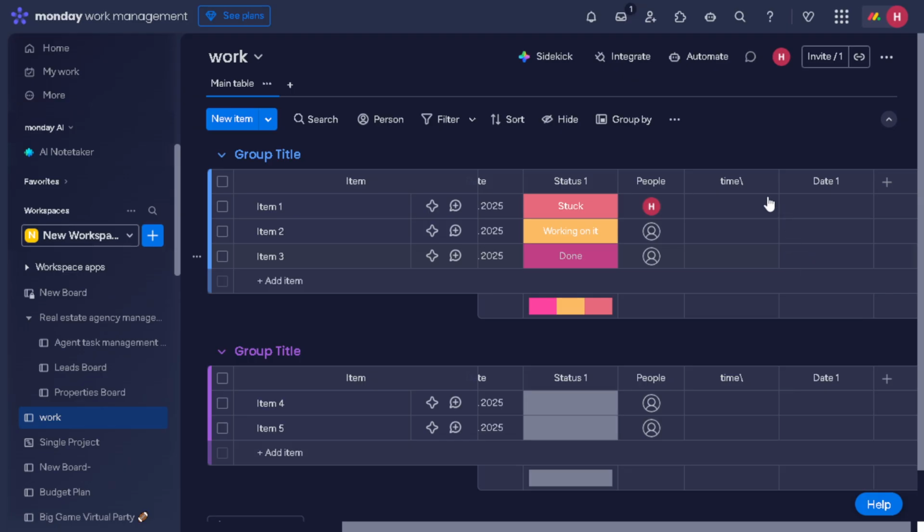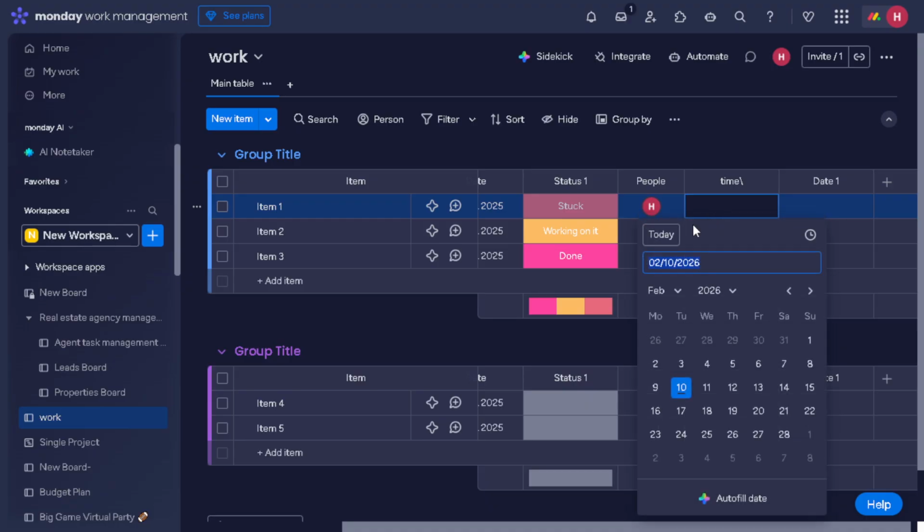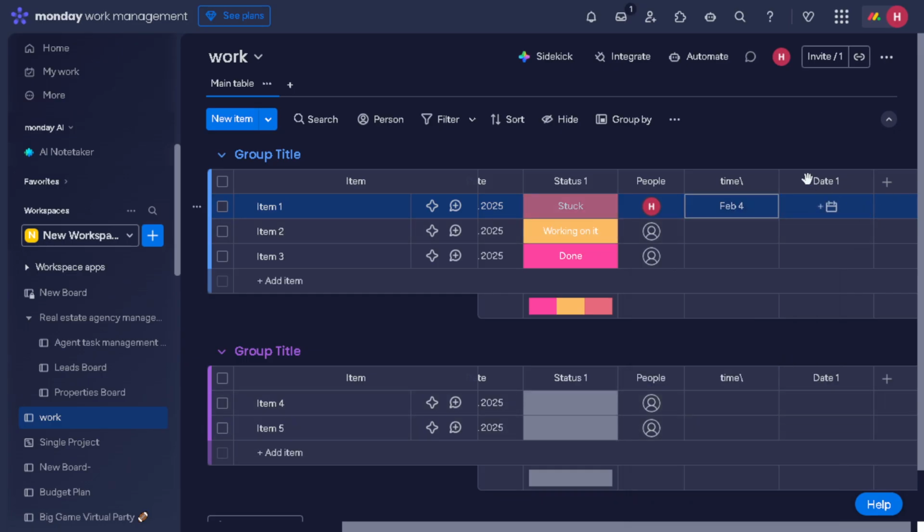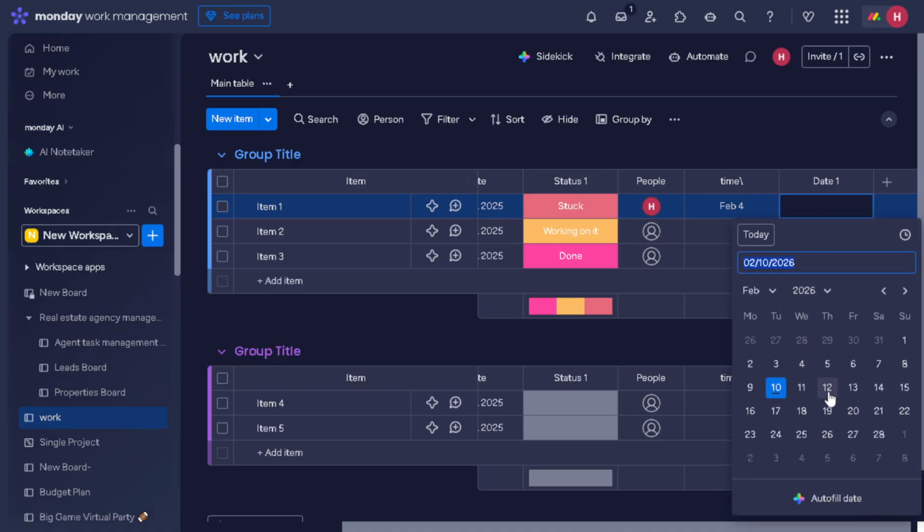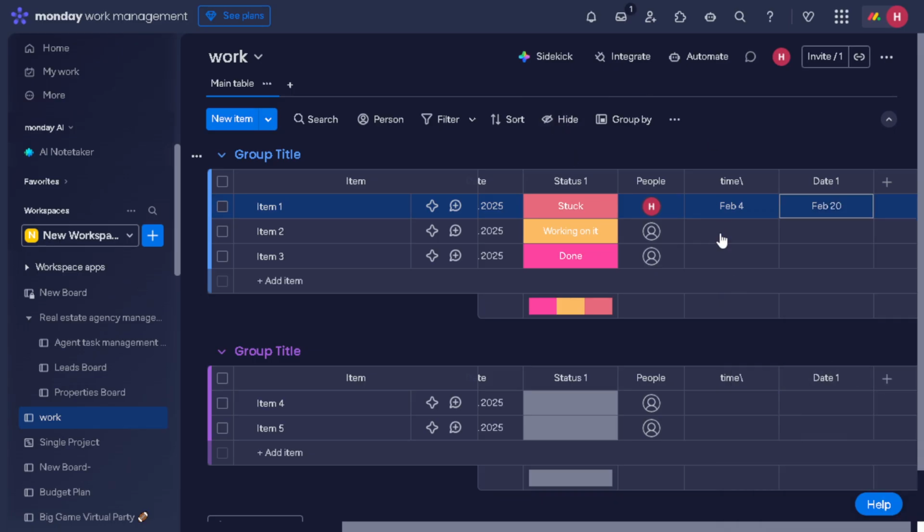After selecting your template, it's crucial to configure the automation correctly. Set the trigger to your due date column. This means that any time you change a date in this column, it will initiate the automation process. Then, for the action, you'll select the event date as the column that should be adjusted automatically. Finally, when it comes to the adjustment amount, make sure to select the offset column that you created earlier. This column contains the numeric values that decide how much your dates will be adjusted.